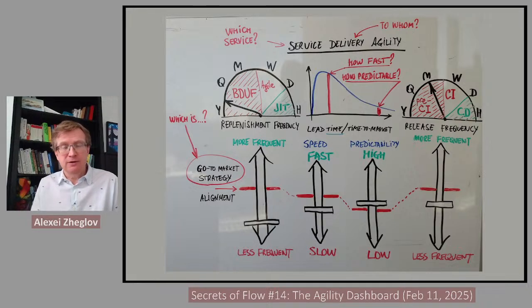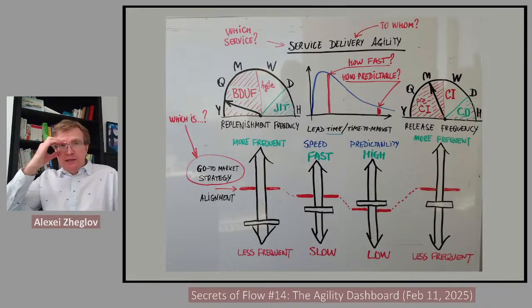So those decision points can become separate and quite clear and explicit, and also form a sort of a sequence where you decide to explore some idea, you build a business case for it, then you perhaps establish technical feasibility, you decide to commit to doing it at some point, maybe before or after any of the other decision points. And finally, you have this commitment point when you actually exercise your real option. All right.